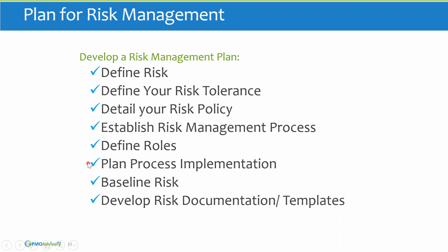And then you want to plan process implementation. So that's another key part of that. So how are you actually going to implement these processes? Are you going to have workshops to identify risks? Are you going to update or assess risks as part of meetings? When are you going to do these things? So you want to plan that.